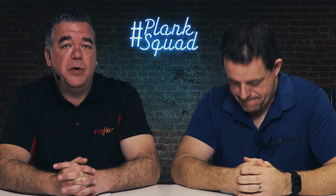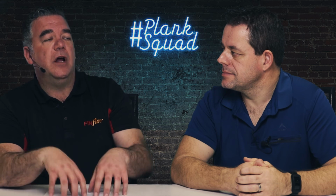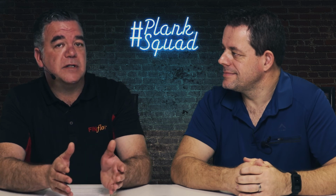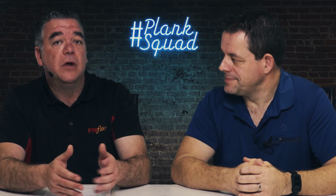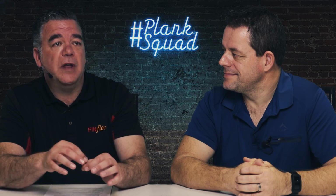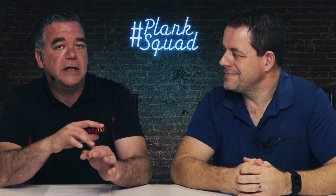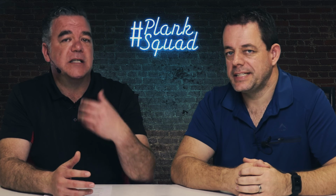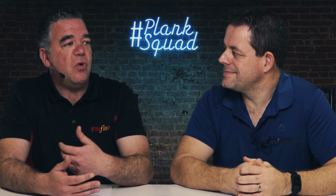Exactly that. If we had just called a site meeting with the kitchen guy, the project manager, the shutter guy, and asked the question, what is going on top of my floor after I leave? No, we've got this, we've got that. Okay, right, well, let's have a meeting. We can either, A, put your carcasses in first, leave your side panels and kick plates off, and then we'll put those on afterwards so you're not putting the floor down. Or B, no problem, you can do that, but just make the hole in our timber floor greater than where it's going to be locked and pinned down, so the floor can still expand and contract, especially if we're floating the floor. So we have to ask the right questions, because ultimately we also have to take a form of responsibility for what's happening afterwards.